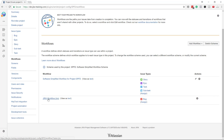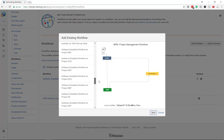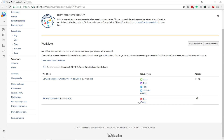To add a workflow, you add an existing one and associate it with an issue type. Please don't forget that JIRA supports multiple workflows — as many as you have issue types. You can have very different workflows for Story, Epic, Sub-task, whatever. With five issue types you can have five different workflows. This is my recommended approach, because in large organizations it's very difficult to have one unified workflow for every single issue type. I've seen some really complicated ones with more than 60 steps.